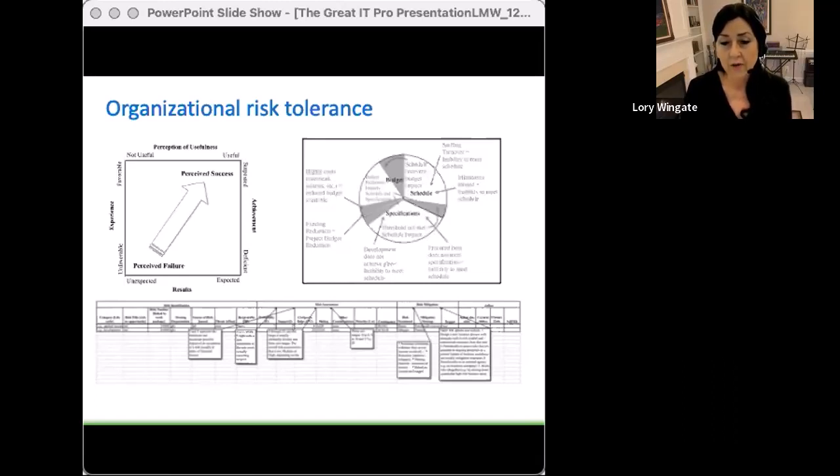Whenever a quality control activity identifies shortcomings, these become risk items. The project manager and the system engineer must work to resolve the issue before progressing. Resolution is through standard risk management for the project and can result in different mitigation strategies. If changes are required to address the impact through the revision of scope, schedule, or budget, the change control process is engaged. In this way, these processes are tightly integrated. If you do one without the next, you're going to miss your targets.